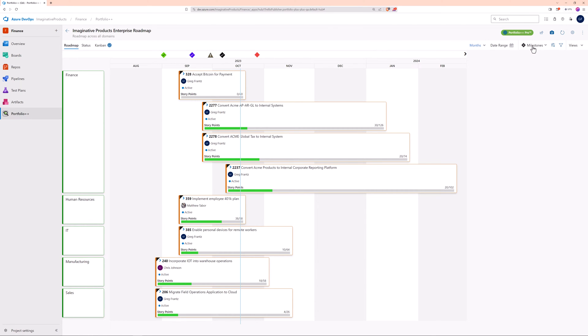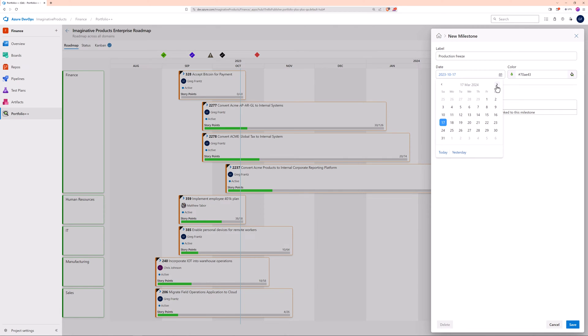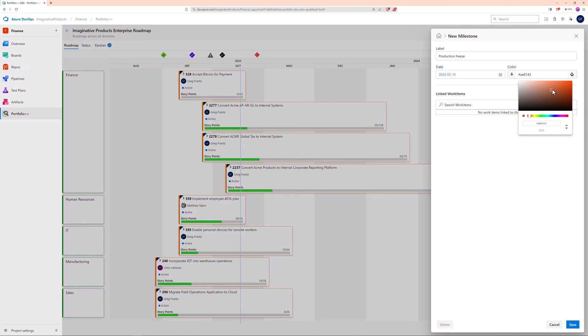Linking your milestones to work items is not required. Milestones not linked to work items are great for keeping an eye on events beyond your control, like a production freeze.